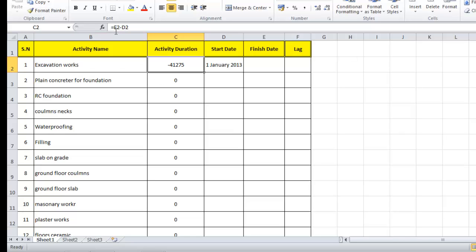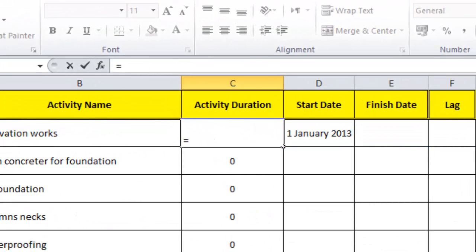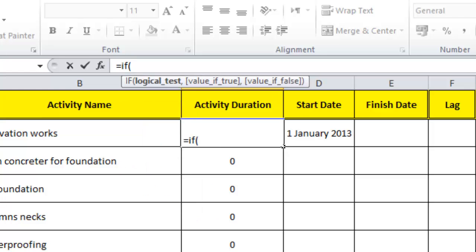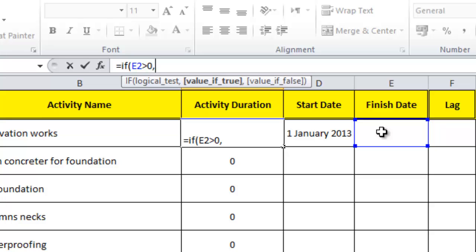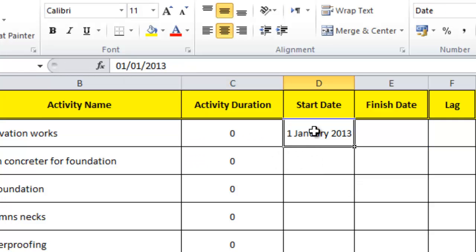We'll apply an IF condition. I'll tell Excel: IF this finish date cell is greater than zero, meaning we have a completion date, then the value equals finish minus start; otherwise, put zero. This prevents Excel from calculating an unreasonable duration before I've entered the finish date.